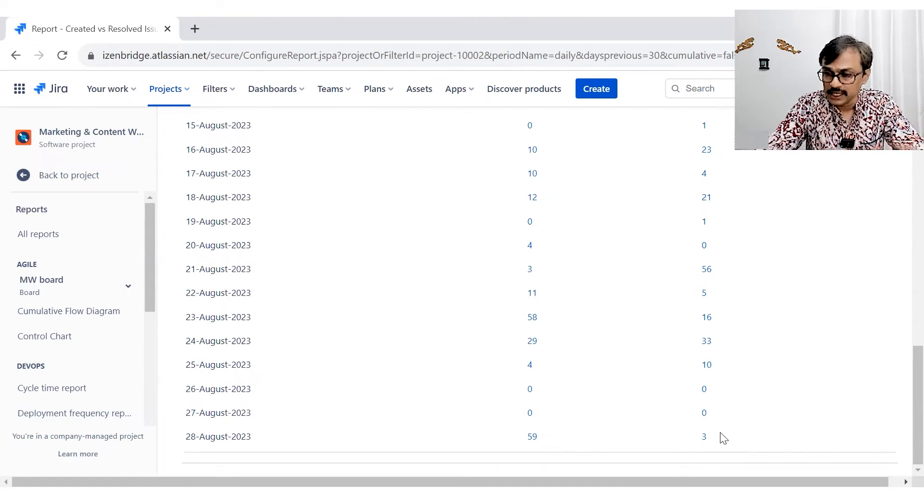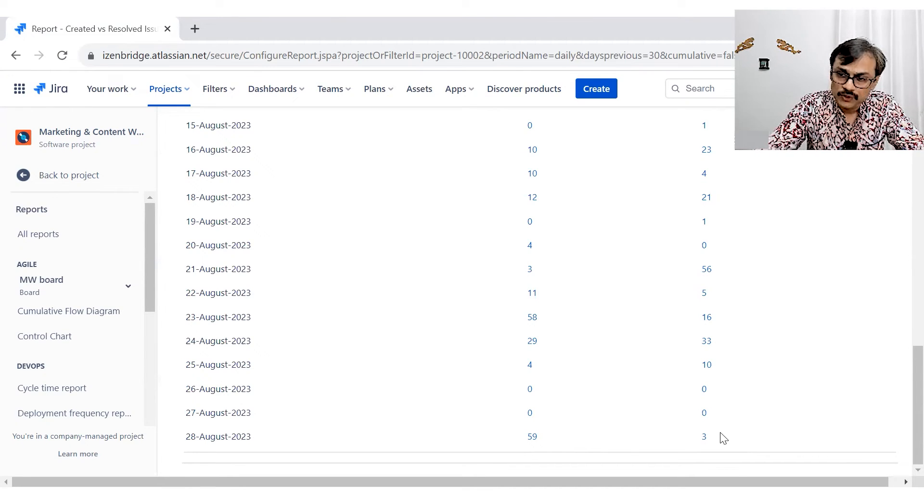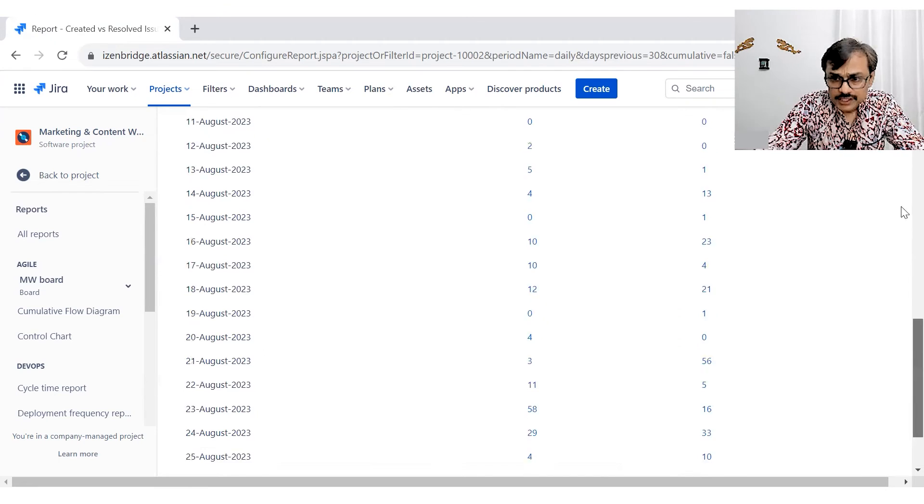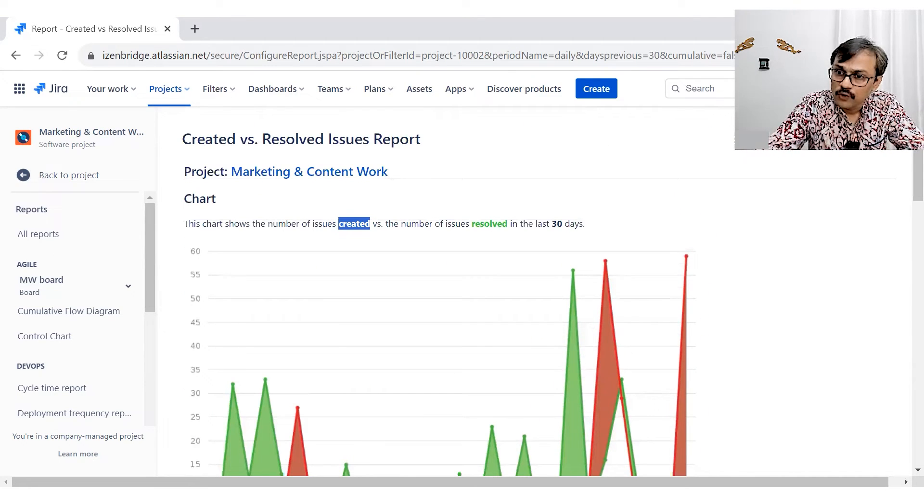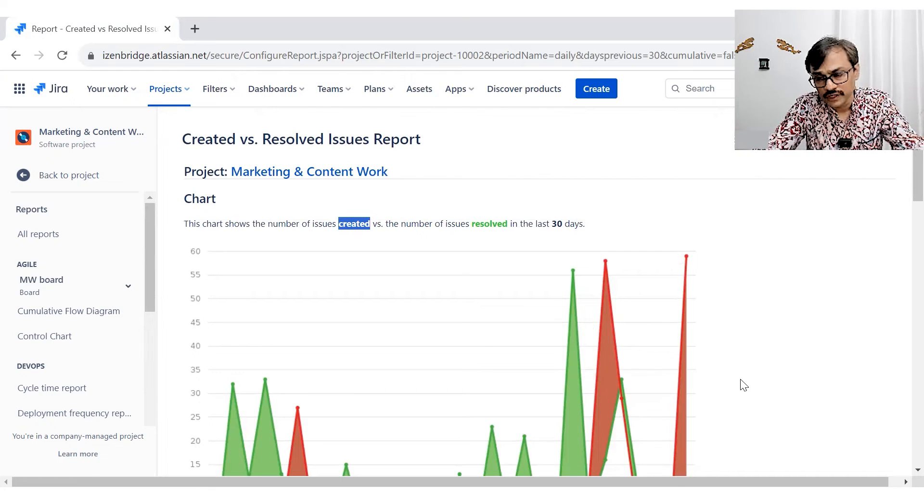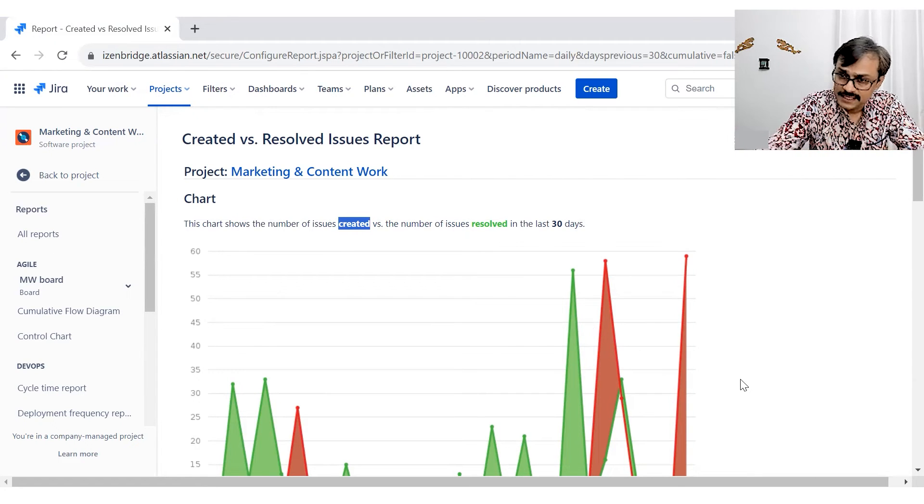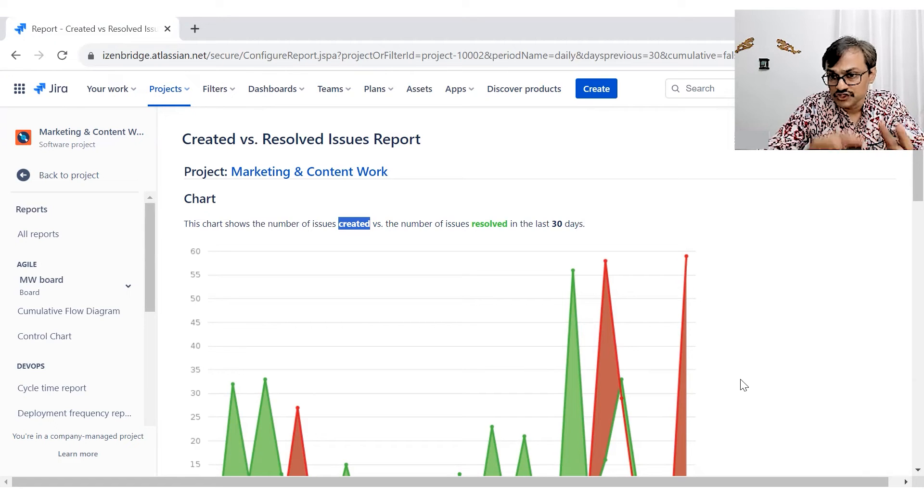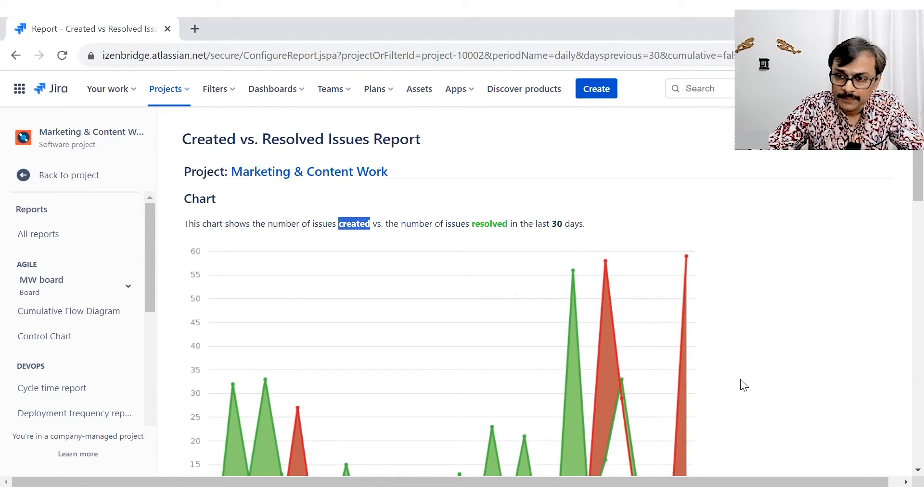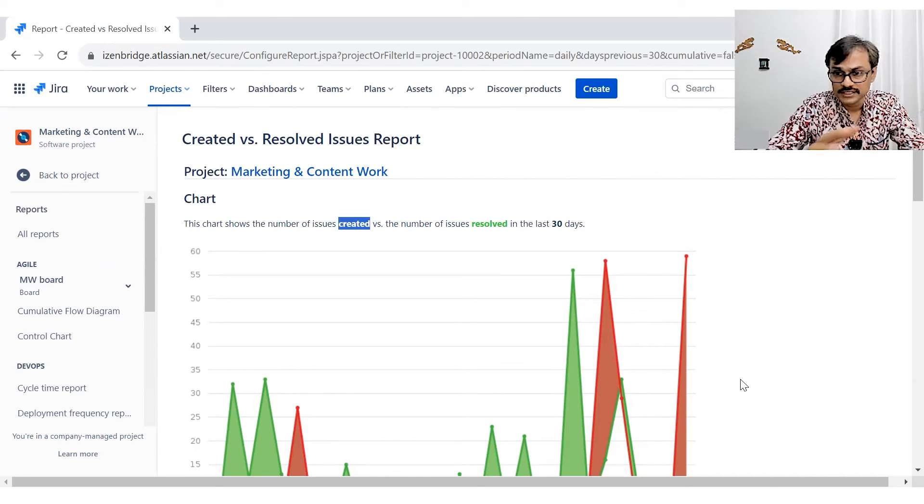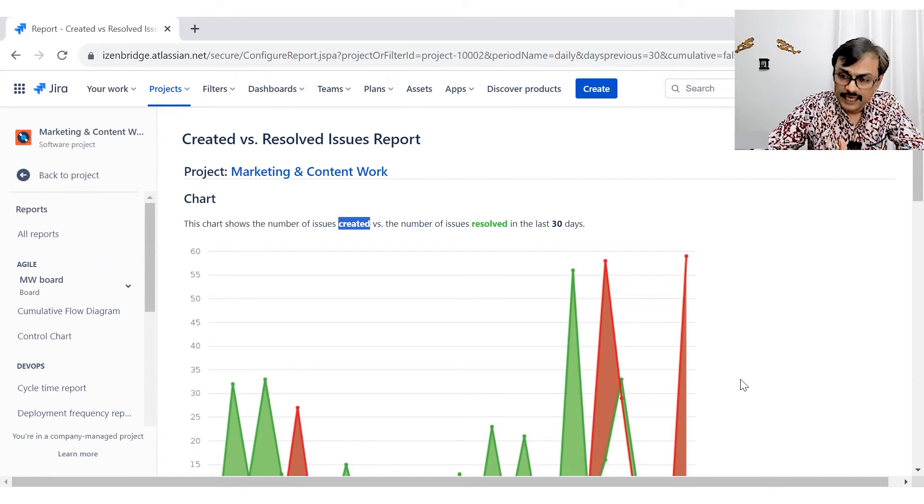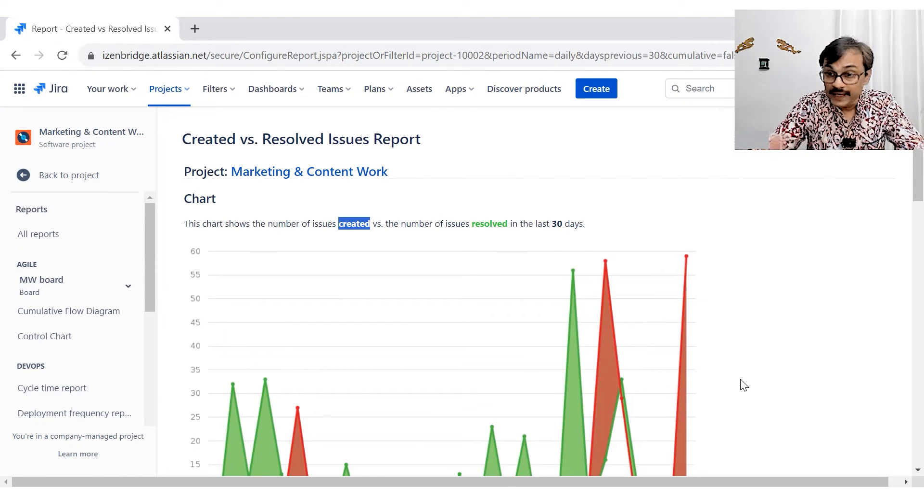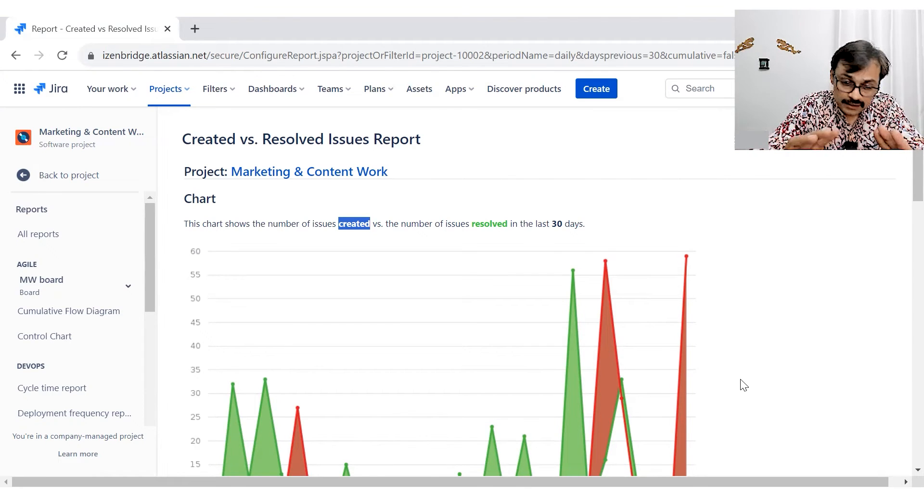At the same time, it can help you in doing a bigger root cause analysis. So in general, it's a trend analysis for your inflow of work and departure of work. It helps you in doing capacity planning. It can help you in seeing the trend of a possible future commitment you can make, because this is something is telling you how much work is getting added to your team backlog and how much work is getting removed.